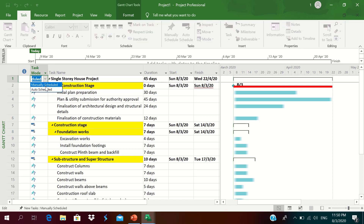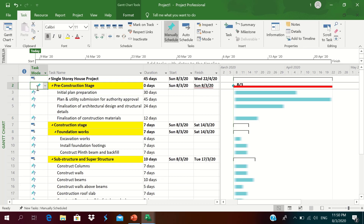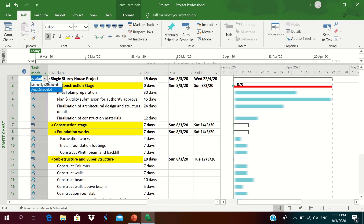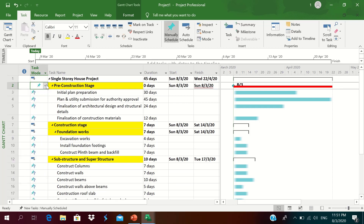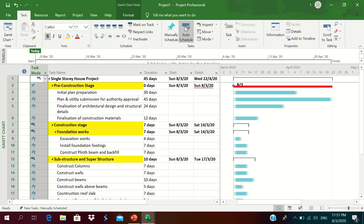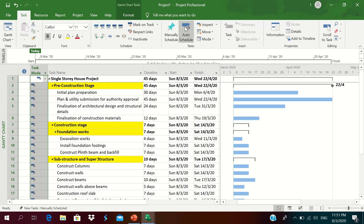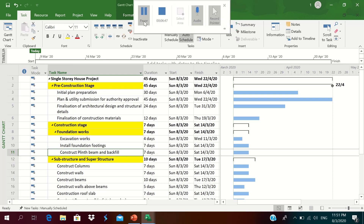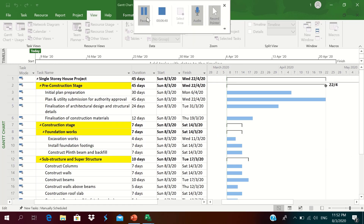We check whether tasks are manually scheduled or auto scheduled. All tasks whose task mode is manually scheduled need to be changed to auto scheduled. We click and change all activities to auto scheduled at once in order to properly link them.